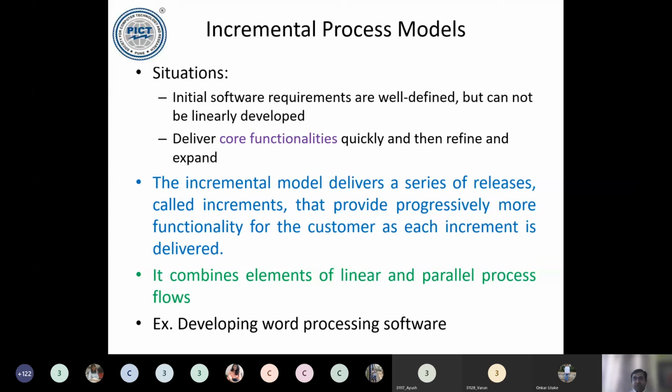So these are some certain things. First we go for the requirements, or we can say the core functionalities or the dependent requirements or dependent functions. If the dependency is not satisfied, subsequent things cannot be done. If the dependency is developed, then we can go for the subsequent functions, because these are dependent on this functionality. That's where we say we are having incremental process models.